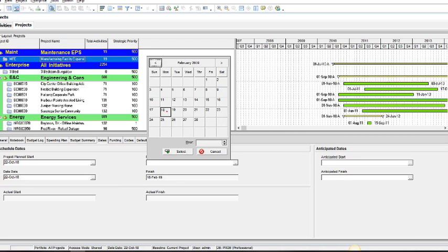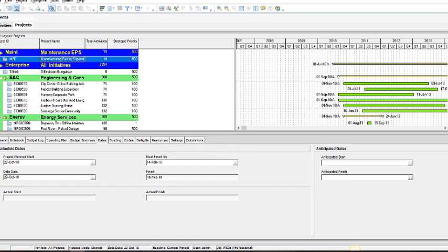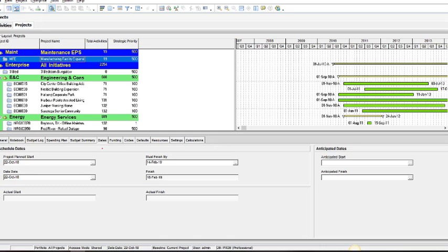However, there could be some projects that have a must finish date. Say, for example, a wedding project. You've already fixed a date, say Valentine's Day, the 14th of February, as the case may be. So this project must finish on the 14th of February as it is. You can select the 14th of February and then click on Select. Once you do that, you have assigned a must finish date to that project in totality, which is what we have just done in this case.